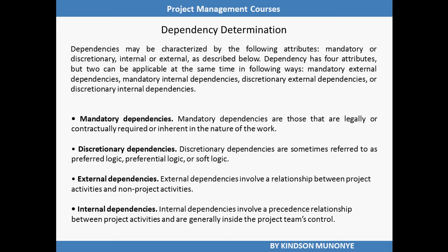Mandatory dependencies. Mandatory dependencies are those that are legally or contractually required or inherent in the nature of work. Let's take, for example, the painting of the house has to be done after the plastering of the house. That is mandatory. You can't change it, and it is inherent in the nature of the work.